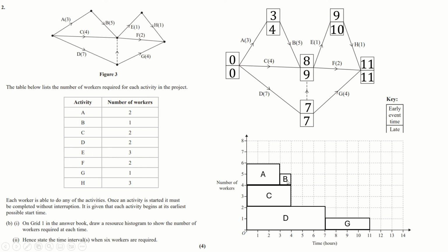It's only one person. So I'm going to put one box there, then follow it with a few boxes here, and still one more hour of B needs doing, so I'll put it down here. Always force it down as far as you can. Don't leave overhangs in your graph. So always force it down like this.